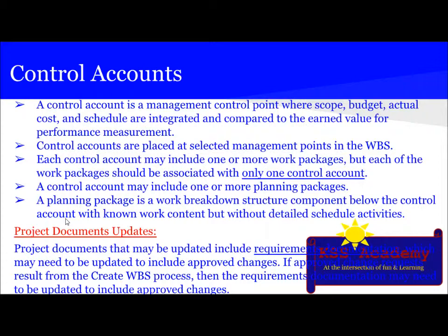Then deliverables may have different levels of decomposition. Excessive decomposition may be ineffective. WBS must include project management work component. Then assign a unique identifier to each item decomposed, and these identifiers are called code of accounts. Then it allows a hierarchical summation of cost, time, and resources. Decomposition could have phases, major deliverables, or sub-projects as the first level of WBS. Then WBS defines total scope of project, which is called 100% rule. Work not in the WBS is outside of the project scope.